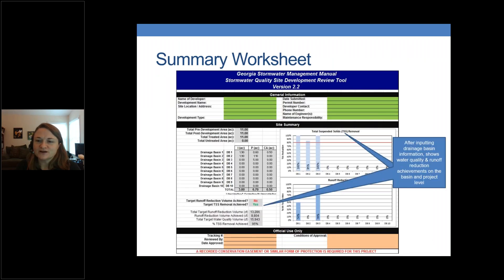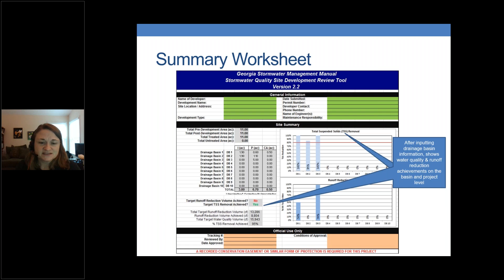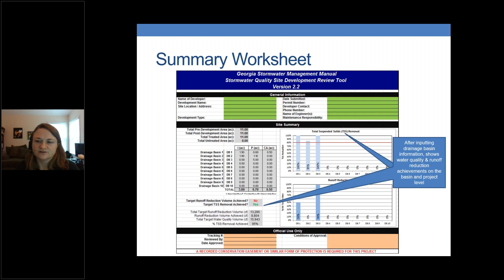After inputting all information in your individual drainage basins, it populates back into the summary worksheet table, which lists all drainage basins 1 through 10 and fills in once the tool is complete. The site summary worksheet gives your total runoff reduction and total water quality volume for the site and tells you whether you met your reduction goals. This final summary page is printed and submitted with your project for permitting, and it provides a visual graphic of runoff reduction and total suspended solid removal at the project level.